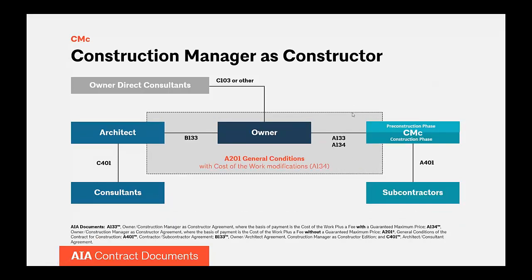First, let's look at CMC, the topic of our discussion today. You see that the parties and relationships pretty much are the same as in traditional bid. The difference is that the construction manager will be present during design phase, and that's generally called pre-construction phase, and then provides the construction. You see those dual roles with the two colors in the CMC box on the diagram.